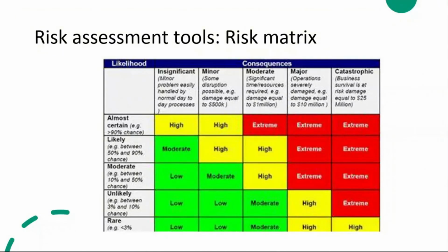After risks are identified, matrices are often used to assess the risk. This slide shows an example of a risk matrix. The risk matrix is an effective tool that assists in risk evaluation by considering the probability or likelihood against severity linked with the potential risks of a project.